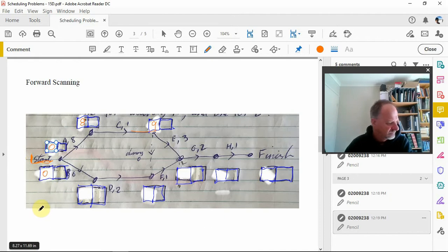All right. Then we go 3 down here, another 3. So the earliest that we can start is 12. And I'll put that there because we can come this way as well. So let's have a look and see what happens coming this way.